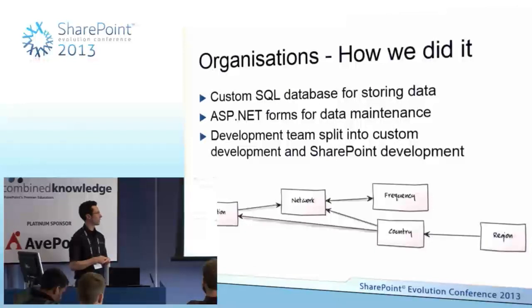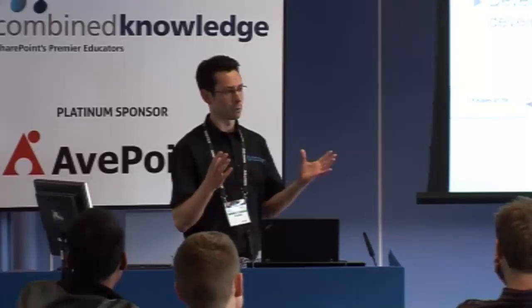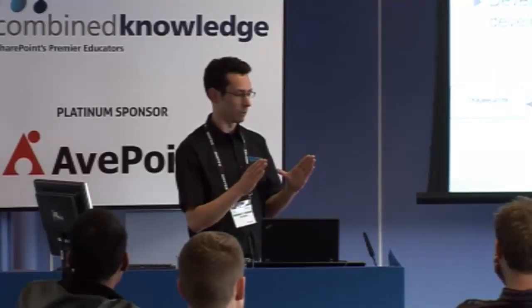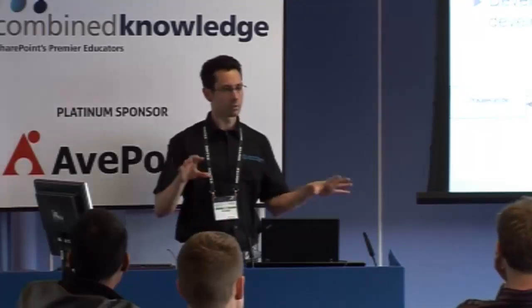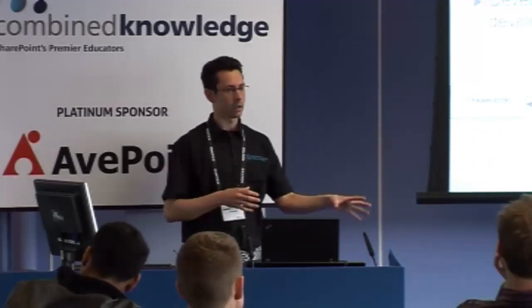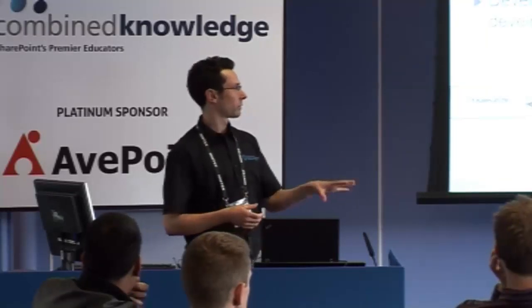And the way we maintain that data is using custom .NET forms that are stored inside SharePoint. So we basically have a SharePoint page which has a custom web form inside of it. This allowed us to split the development team into two, so we could have one team focused on the custom ASP.NET components and another team focused on SharePoint. This was good because the SharePoint resources were quite hard to find, so developers were able to work on part of the system without having to know anything about SharePoint.